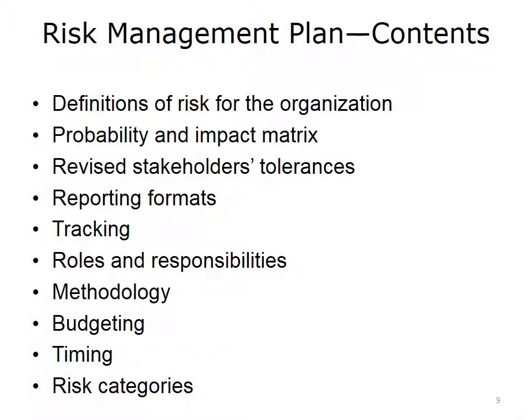The risk management plan outlines how risk occurs during the project and how it is managed. Generally speaking, it classifies or categorizes risk, outlines the response, and describes who or which role is responsible for implementing the response. It also includes the following specific content: your organization's definition of risk, definitions of risk probability and impact, revised stakeholders' tolerances, reporting formats, information about how you will be tracking the risks.